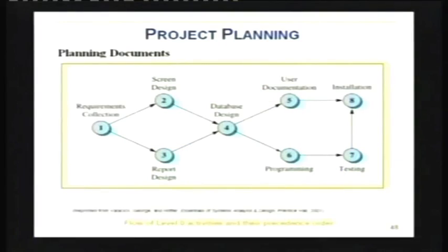You'll see in a couple of minutes, on this slide up here, we have a certain task to be done, and that is about installation of a particular software, completed system design. And these have been identified as nodes here. You see the nodes here. Those basically identify the tasks that have to be done and the sequence in which they'll have to be done. This is the beginning of your planning. Your planning must begin with this, first of all, a list of the tasks which come from the WBS, and then sequencing, where help is provided by the domain expert.